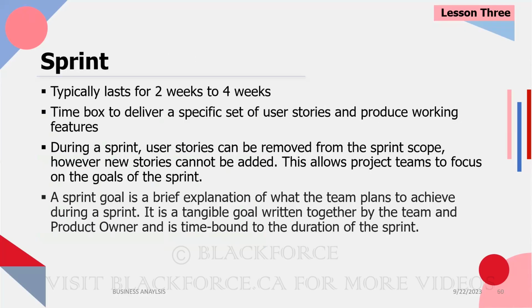Okay. I talked about the sprint, which is a time boxed period during which a selection of requirements is implemented. Okay, so the sprint is usually 2 to 4 weeks, usually more 2 than 4. Virtually all the sprints I've gone to is 2 weeks, but it can be more than 2, it can be 3, it can be 4. It's a time boxed period, has a start date, has an end date, and within that defined period, we're going to work on the user stories or the requirements that we selected into the sprint backlog.